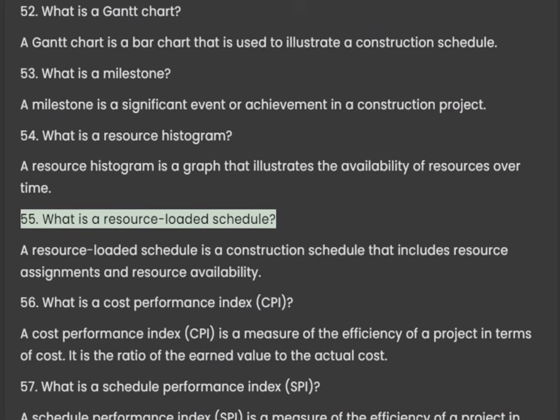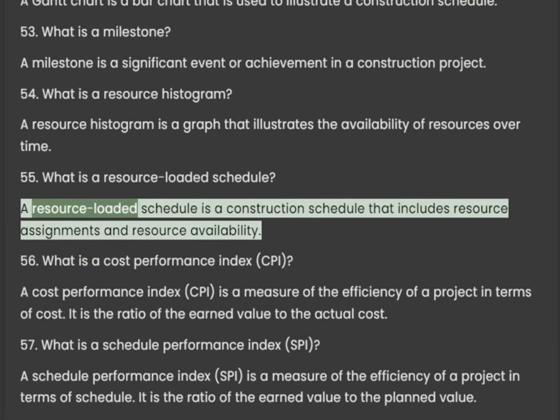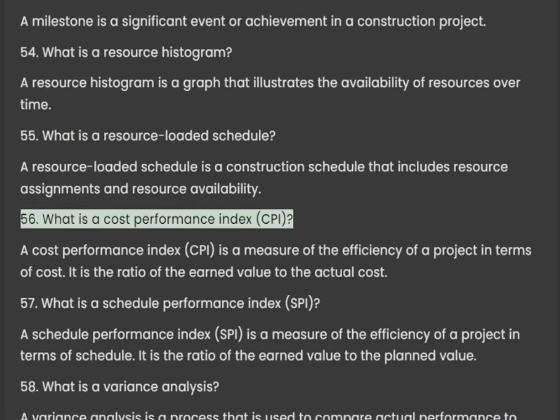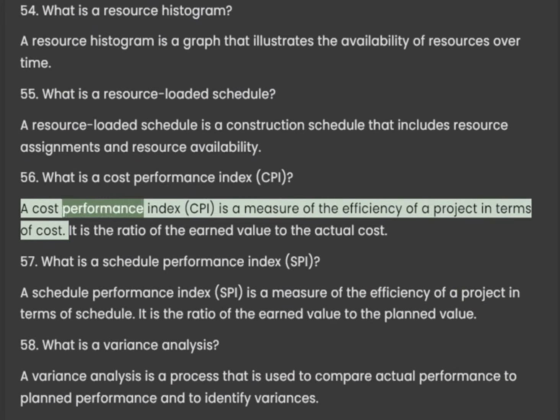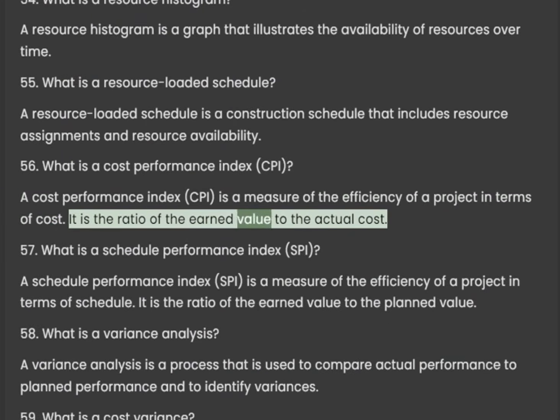55. What is a resource-loaded schedule? A resource-loaded schedule is a construction schedule that includes resource assignments and resource availability. 56. What is a cost-performance index? A cost-performance index is a measure of the efficiency of a project in terms of cost. It is the ratio of the earned value to the actual cost.